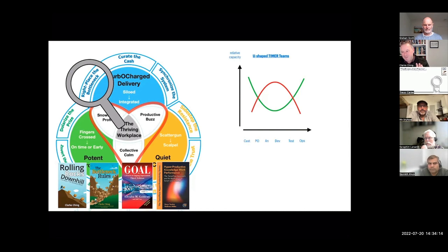And so if you look at that team without the eyes of a bottleneck, you look and you go, everyone's busy. The developers in that team were maybe busy, say, 3 or 4 days out of every fortnight. So if you could work with the product team to make sure they were doing product work, say, 5 or 6 days every fortnight, that would be a doubling of capacity. But if you looked at them, everyone was busy. And the heuristic we use as people is, are they busy? Yes. Oh, they're productive. Brilliant work.